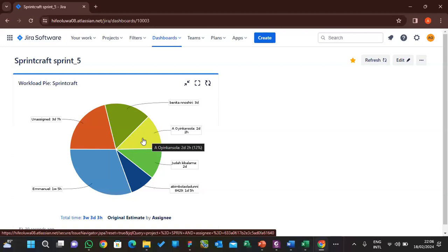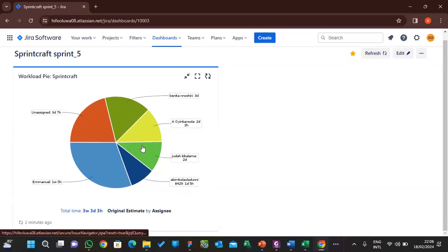Or you ask the team, of course, they know how to do it. They can say, okay, I'll finish my own in 2 days. I'm still free, give me some work. So the Scrum Master will now go back to this board and maybe reduce 2 hours of work from dummy and give it to maybe JTech. You can see that their percentage of work is different based on their workload. You can see Ima will have the highest, 30%. This one is unassigned, 21%. So this is how you do time tracking and workload estimate.